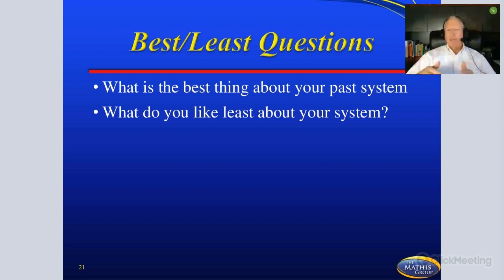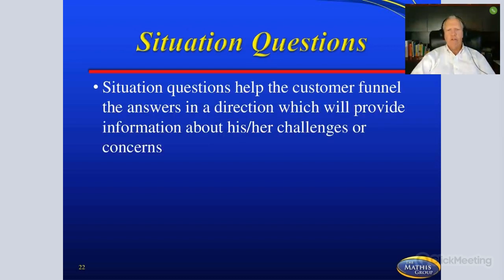And you can do that with anything. So what's the best thing you like about this product or this approach? What's the least thing you like about this product or approach? And it allows you the opportunity to find out from that customer, this is a mainstay. They don't want to lose this. And this one here, this is something that they don't like as much.